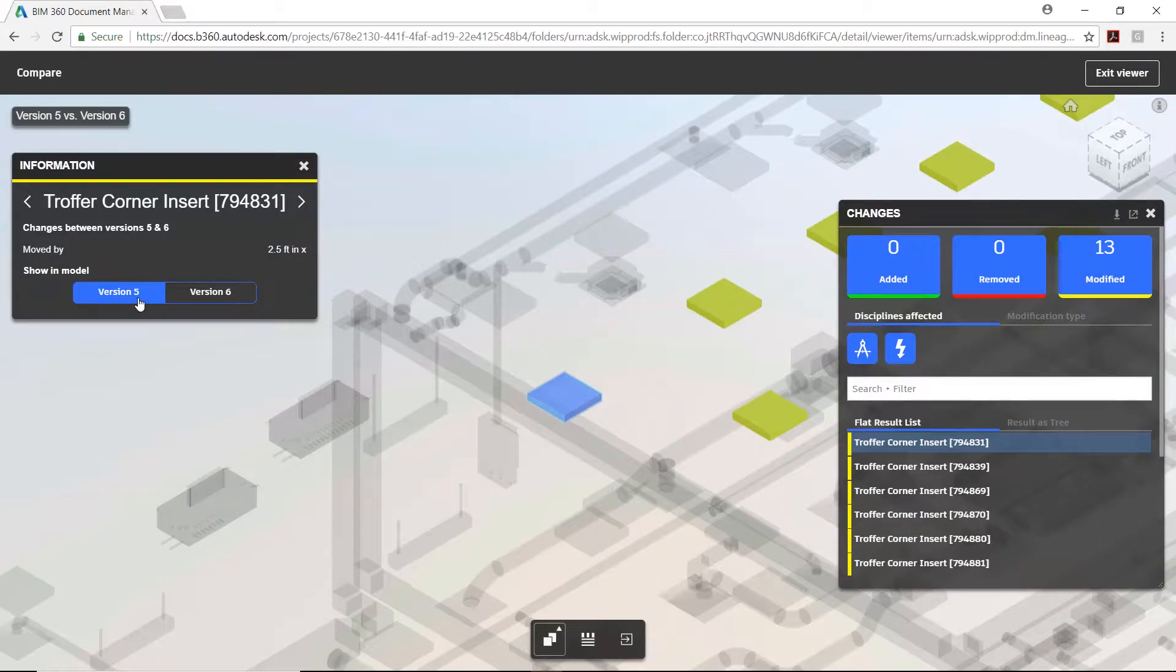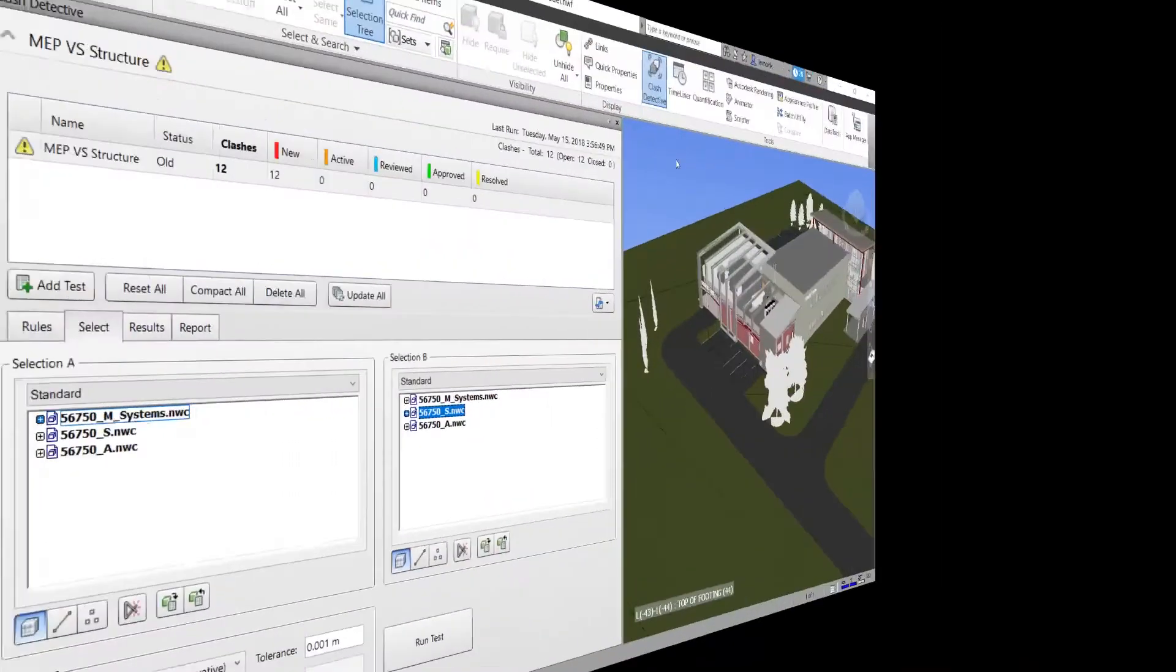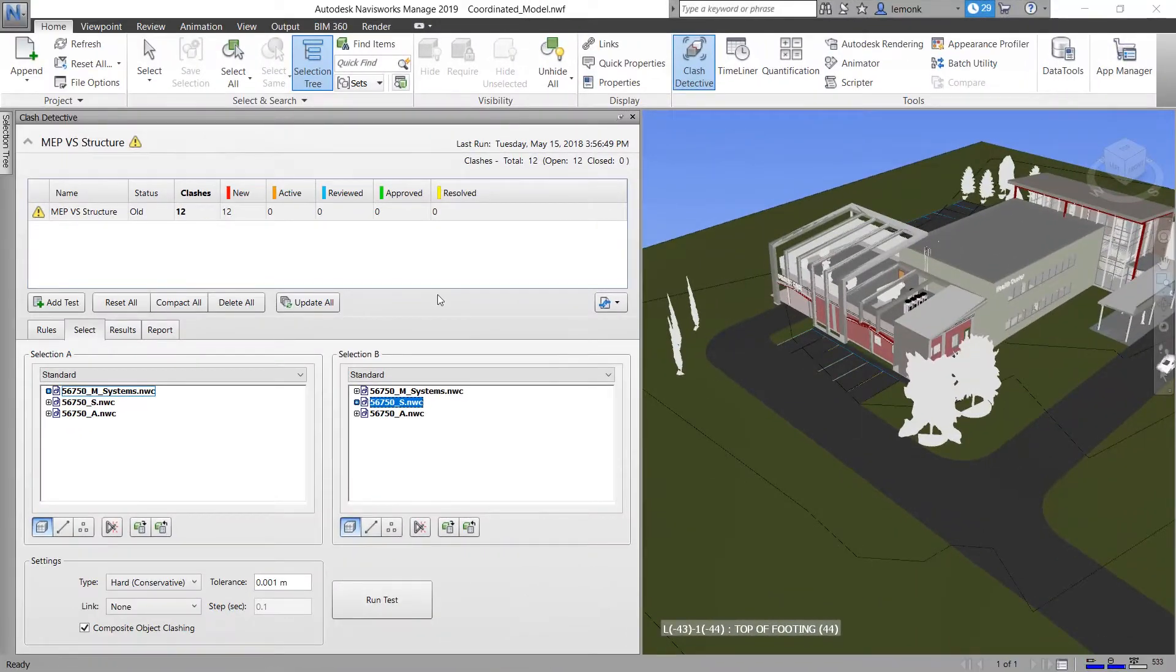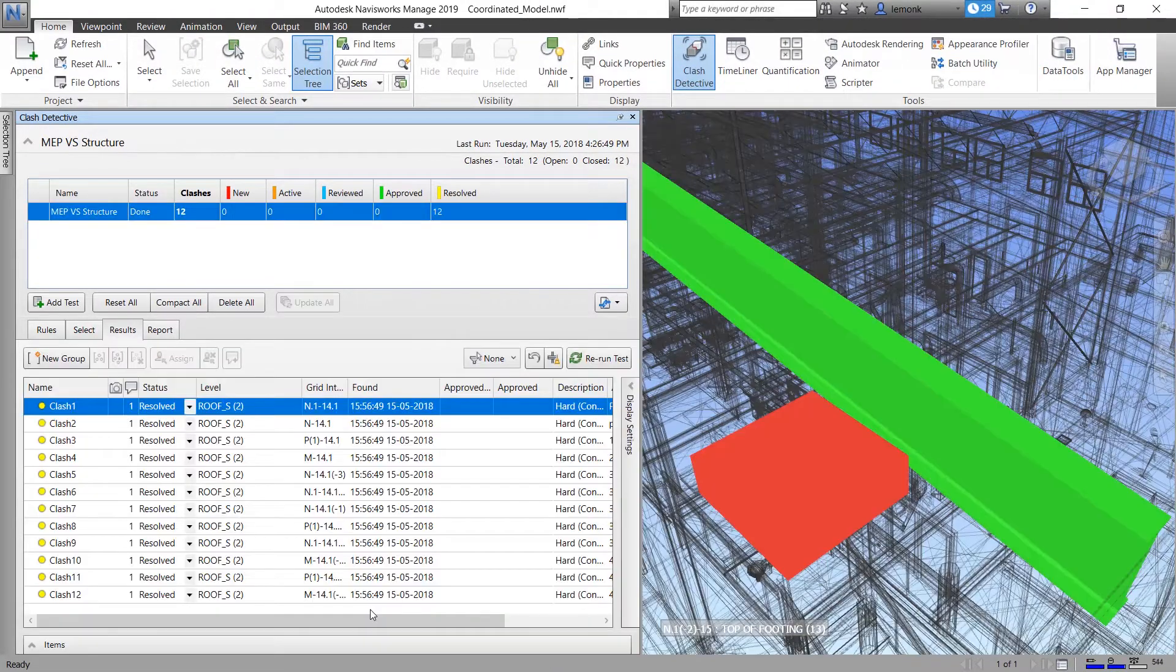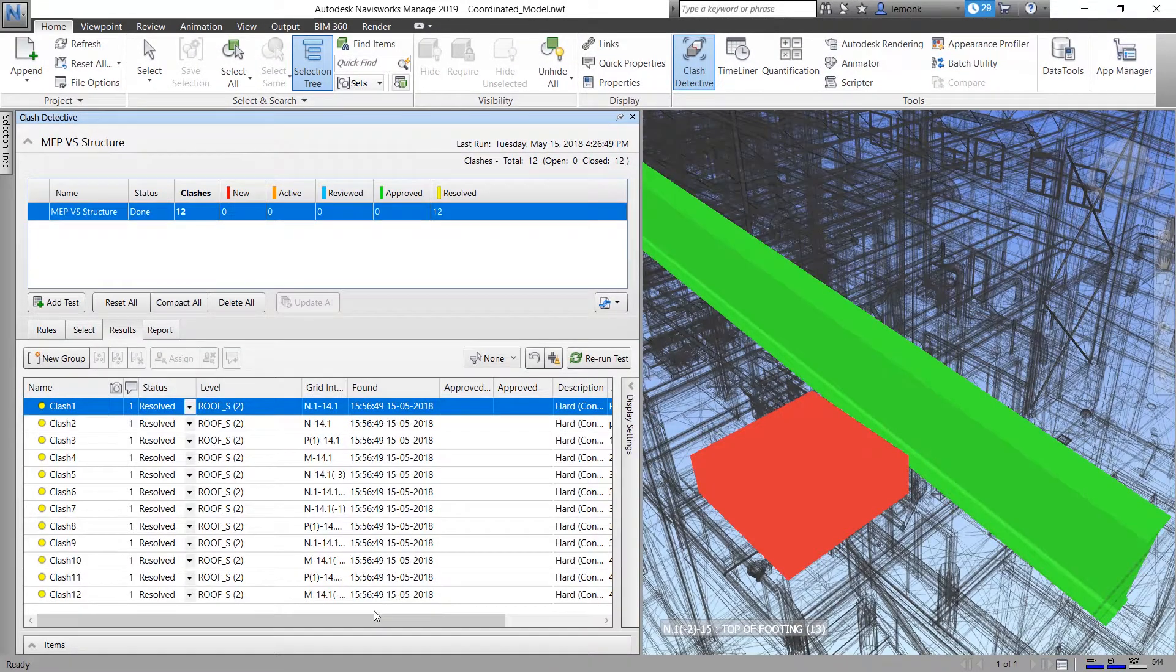With this information, the project manager asks the structural team to run another clash detection test in Navisworks, where the test shows that all the previous clashes have now been resolved.